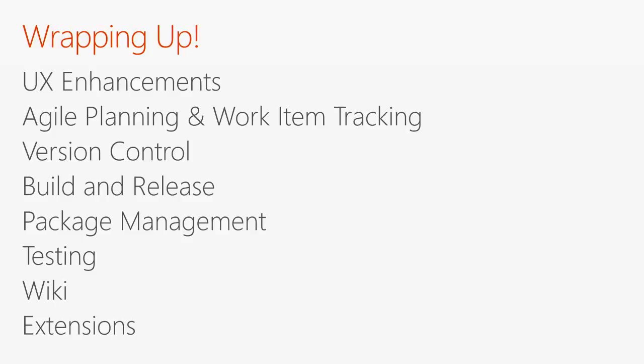So I'll give you an example. I've got teams within Microsoft that want our team to build features to make VSTS better for them, and so that's our first-party backlog. We've got a big long list of them that we've prioritised, but those work items actually belong in different feature crews' backlogs. So it's exactly your scenario. My general advice is put the work with the people who are doing the work, and then use queries to bring that all together into some sort of consistent view.